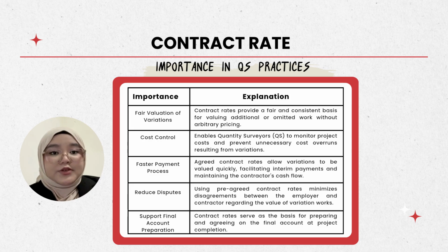And next is reduced disputes. Using pre-agreed contract rates minimizes disagreement between the employer and contractor regarding the value of variation work. And last but not least is support for final account preparation, where contract rates serve as the basis for preparing and agreeing on the final account at project completion.